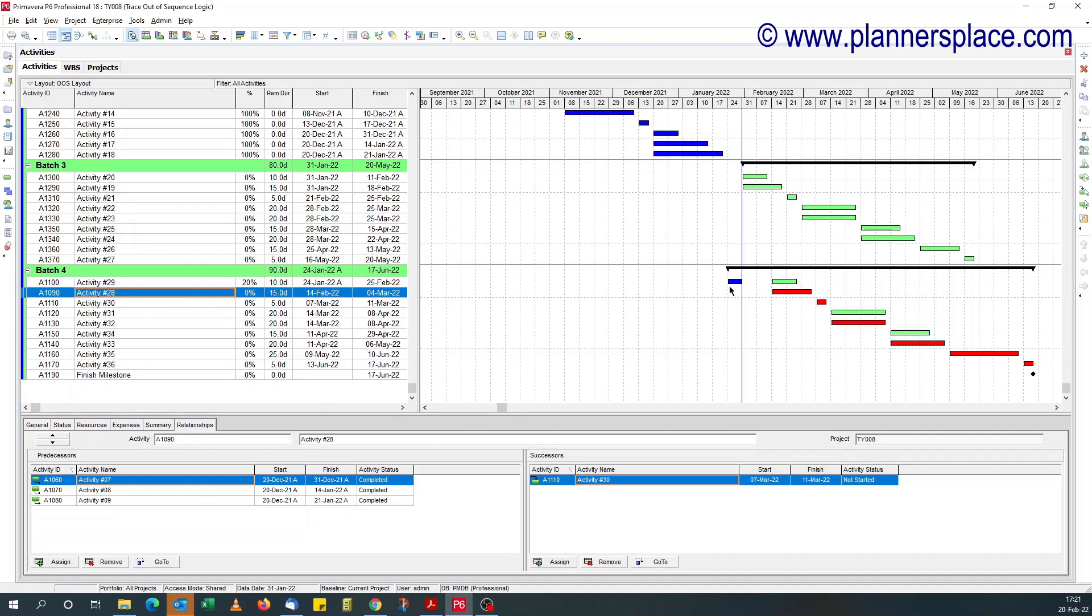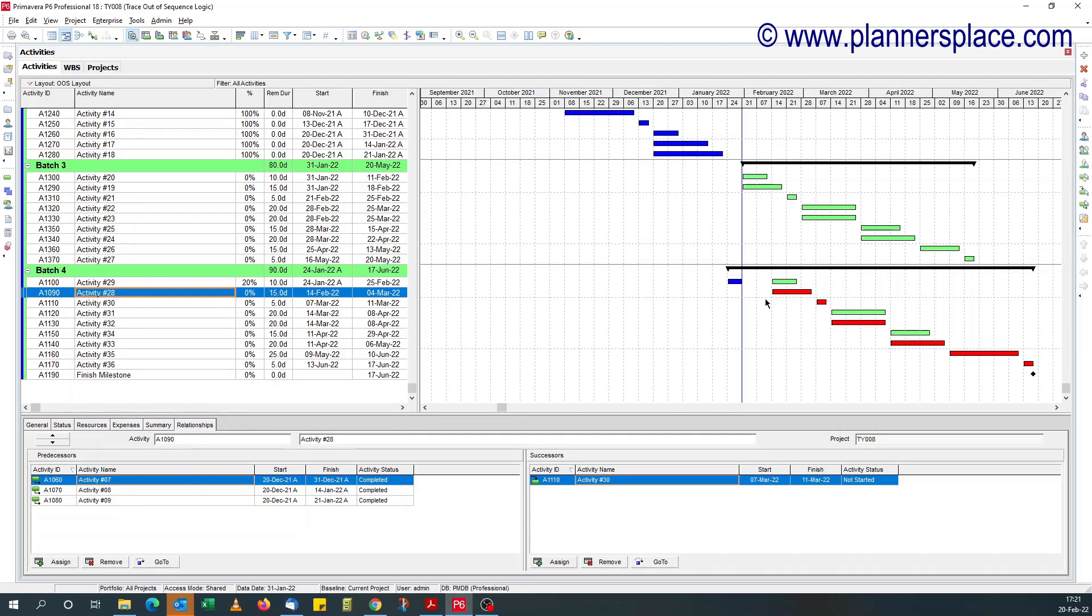So if you look at this activity that has not started, all the predecessors are 100% complete. So you expect this activity, activity number 28, to start on the data date, but it doesn't.